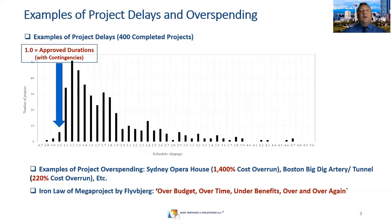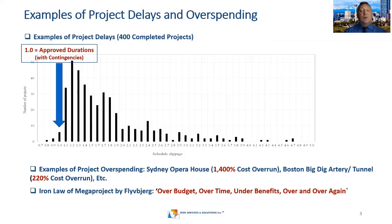Let's start with some examples of project delays and overspending. From my book, this is about 400 completed projects and most of them were actually delayed. The distribution is quite skewed — parameter one corresponds to approved durations when a project met targets, but most were delayed by 100 or even 200 percent. There are also many examples of overspending: Sydney Opera House with 1,400 percent cost overrun and the Boston Big Dig Tunnel, characterized by 220 percent cost overrun.